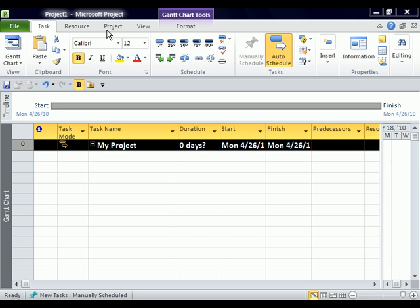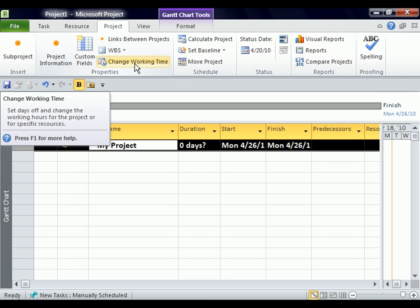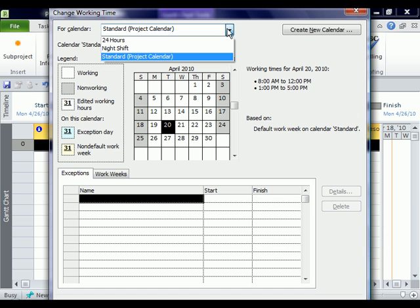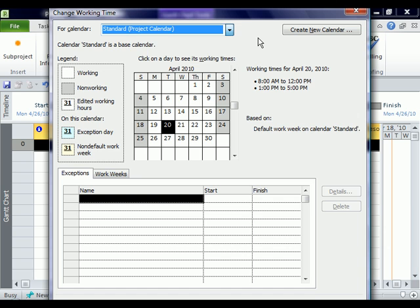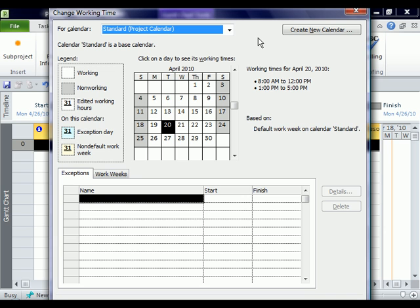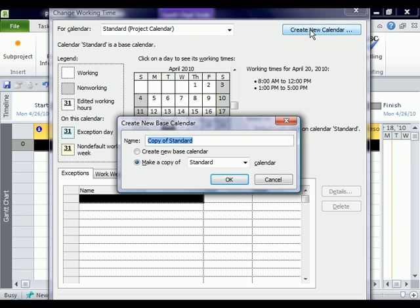In order to do that, we actually have to go to the Project tab and then right here it says change working time. I'm going to click that button and this should look fairly familiar to you. You can either use the standard, the 24 hour or the night shift or you can create your own calendar. I like to create my own with the company name and I like to do this so that I can use the organizer to copy it over to other projects. Otherwise, I'm stuck with the standard, eight to five with an hour lunch break and that doesn't always work out very well. So I'm going to click create new calendar, but I want it to make a copy of the standard.